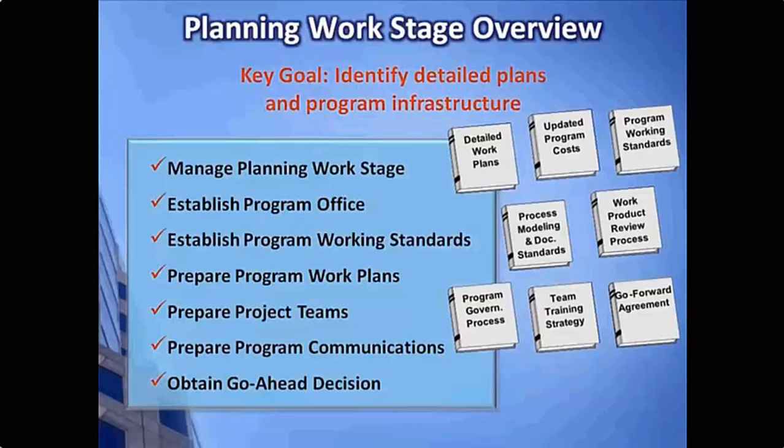If there are any tools that are to be used in design, or maybe even just simply things like Microsoft Office tools as a standard for producing documents, setting up maybe a SharePoint or document repository site for all artifacts as the project is proceeding through its paces. Those are examples of program working standards that you need to identify at the front and put into place.